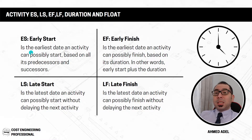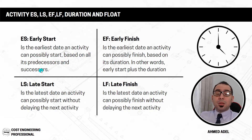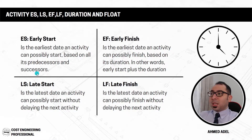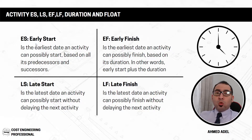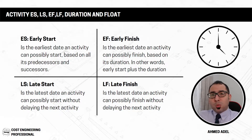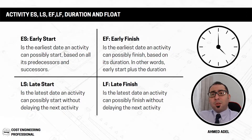The early start is the earliest date an activity can possibly start based on all its predecessors. A predecessor is the activity that comes before the current activity, and a successor is the activity that comes after. For example, to complete the first floor slab concrete works, the sequence might be: formwork first, then steel reinforcement, then cast the concrete. The predecessor of steel reinforcement is formwork.